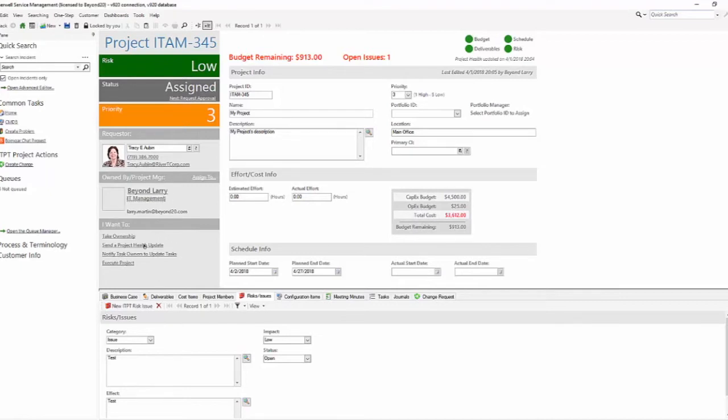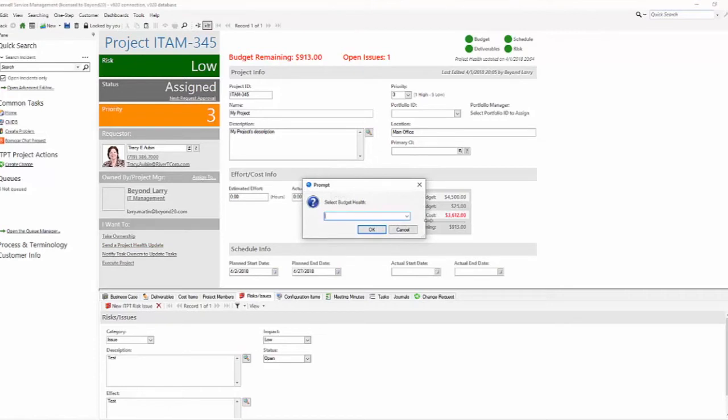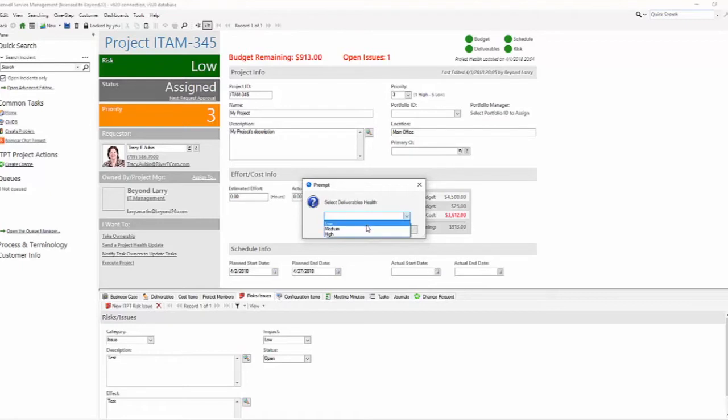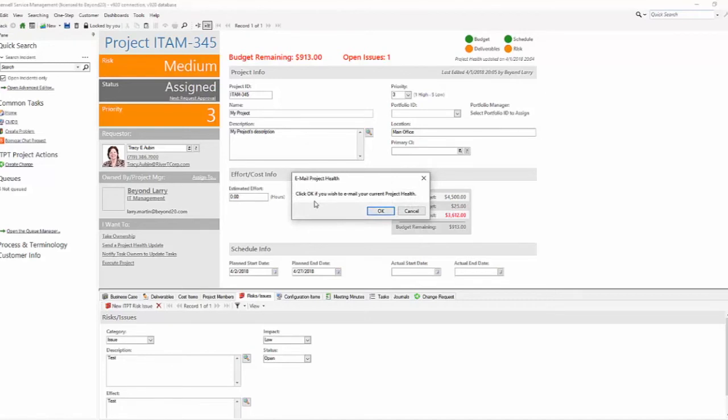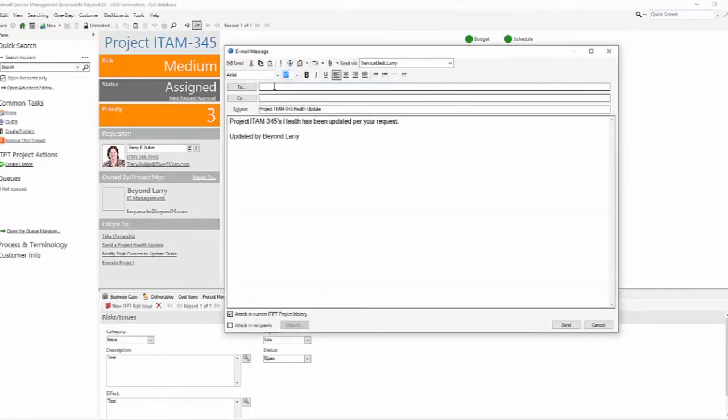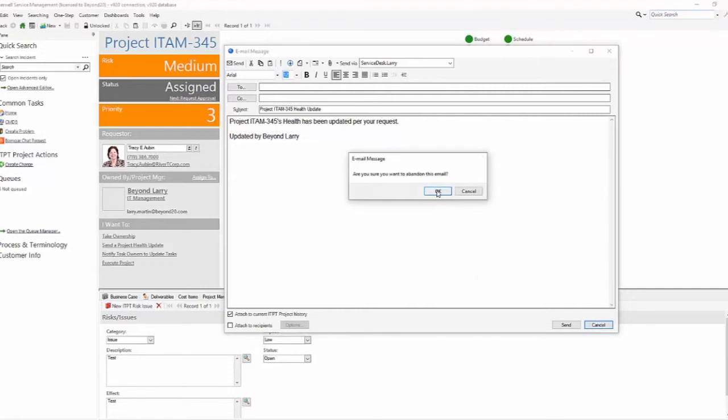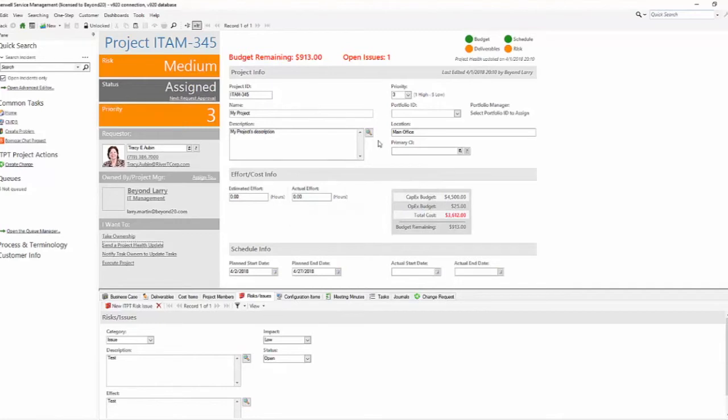You have an I Want To section. In the I Want To section, you still have the ability to take ownership. You can send a project health update. This is a little interesting, in that when you click this, you select what the budget health is. There's no automation behind this. What the deliverable health is, what the risk health is, and finally what the schedule health is. Once you've done that, if you hit OK, it pops an email for you to send and then you can include any additional information that you need to. Since I selected medium for a couple of the items, these icons change and show a new health update and color.